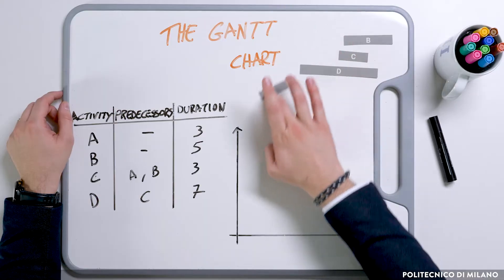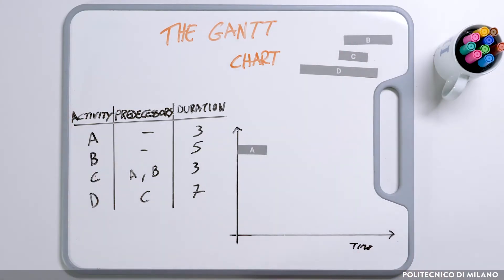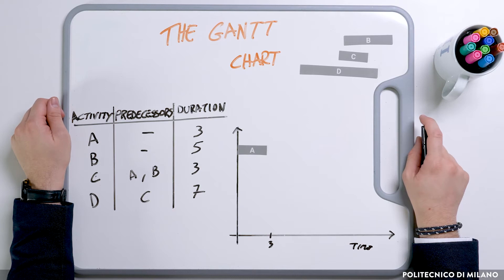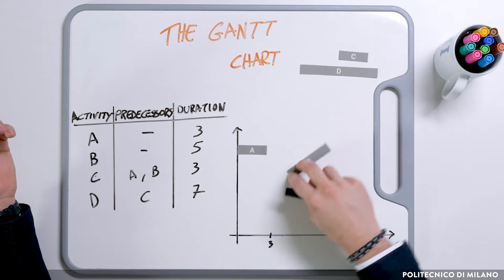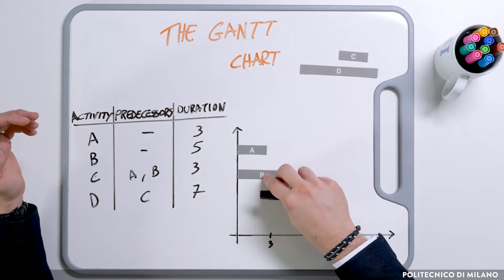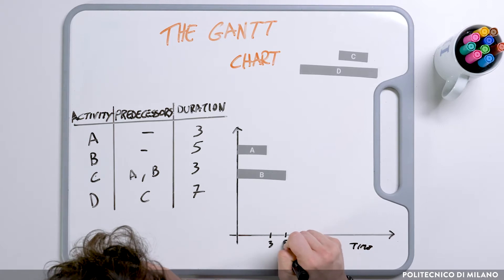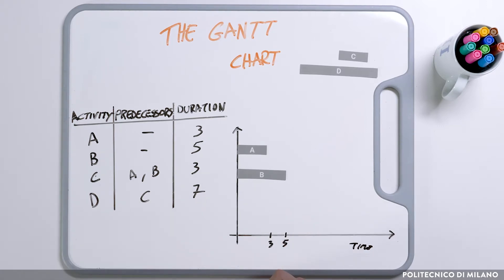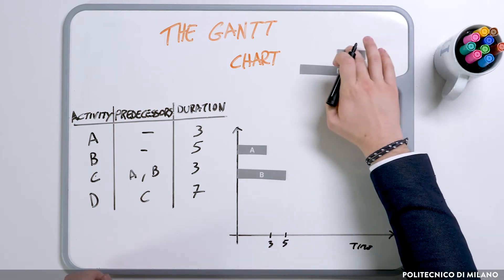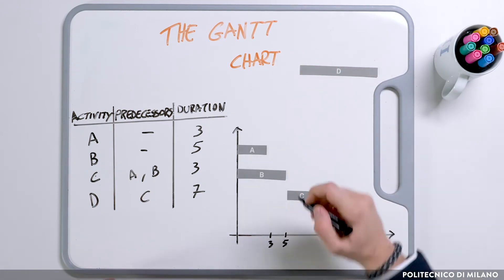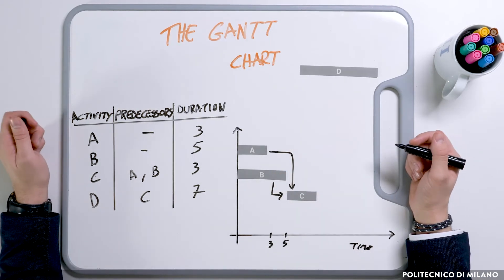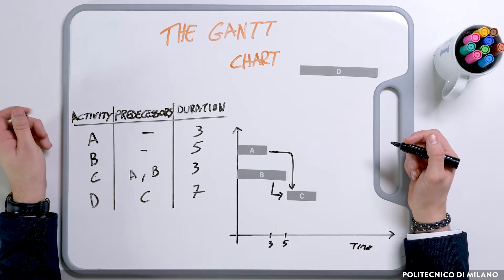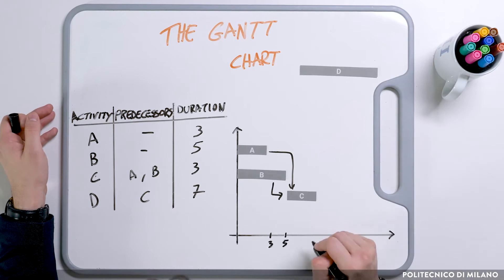Activity A is planned to start at 0 and end at 3, since it has no predecessors. Activity B is also planned to start at 0, since there are no predecessors in this case either, but it lasts 5, so it will end at 5. Activity C is different — it has two predecessors, A and B, therefore it needs to wait for both activities to end before it can start. Lasting 3, it will start at 5 and finish at 8.